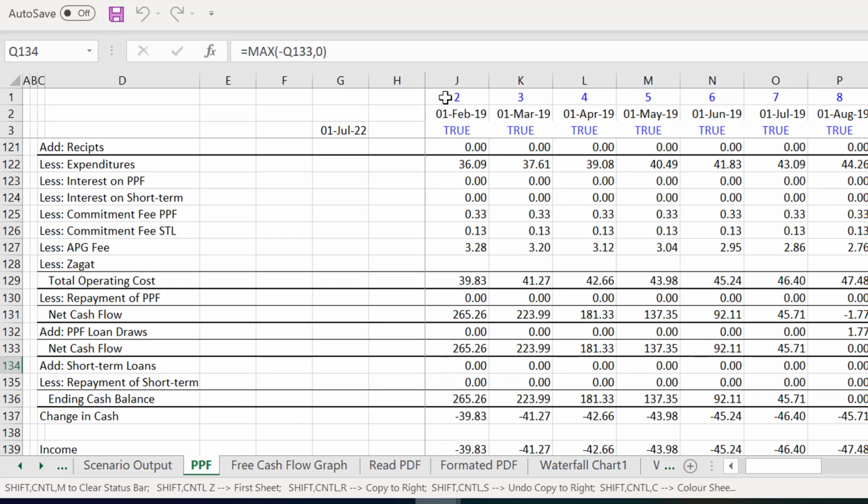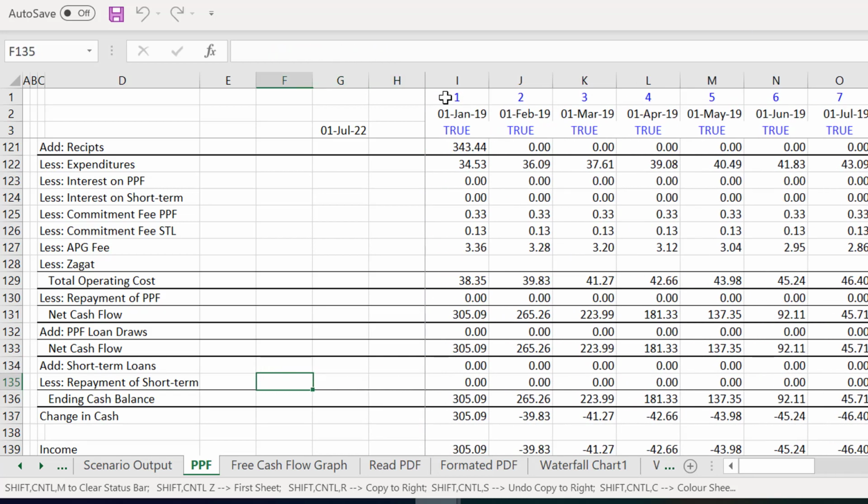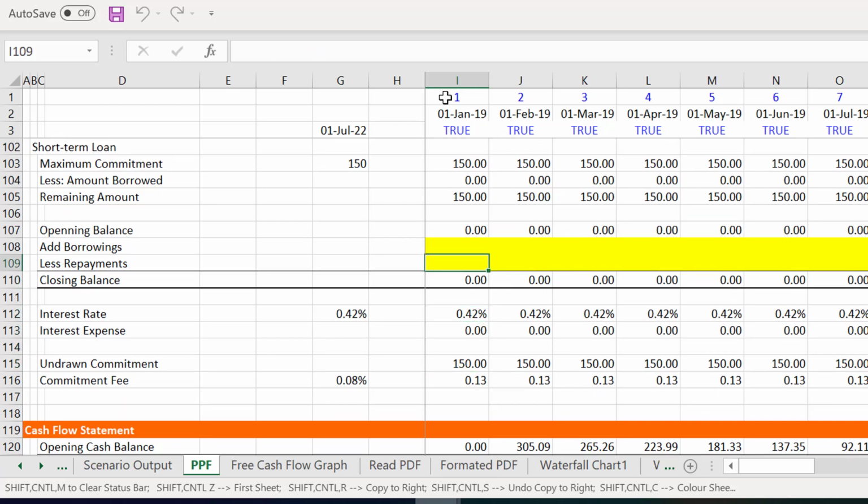And then I say, oh, well, what happens if it's still negative? That could be a default in some cases, but in this case, we have this other debt facility, so we can just keep borrowing on that facility. And then eventually we have to repay. So this has got a maximum. That's how much we have to borrow. I said there was no limit. I probably should have fixed that a little bit, and I could have put the commitment in. Remember that? Okay, that was a mistake. And then we put the repayment, and that's when the maximum is positive, not negative. And those two things, with the minimum and maximum, go way right up here.